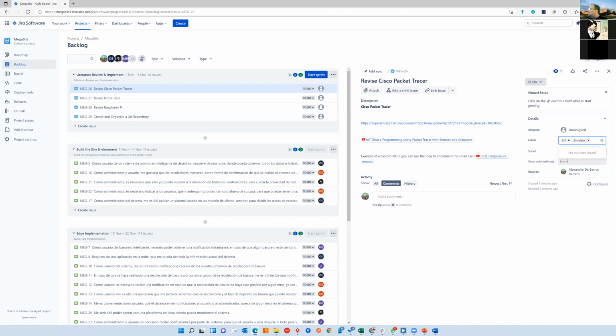And okay, how do you calculate the story point? For example, I try to clarify. Well, a story point means how many hours to you? One story point. Maybe like 2 hours. 2 hours? Okay. If one story point means 2 hours, how many hours do you plan to work in a day in the project?